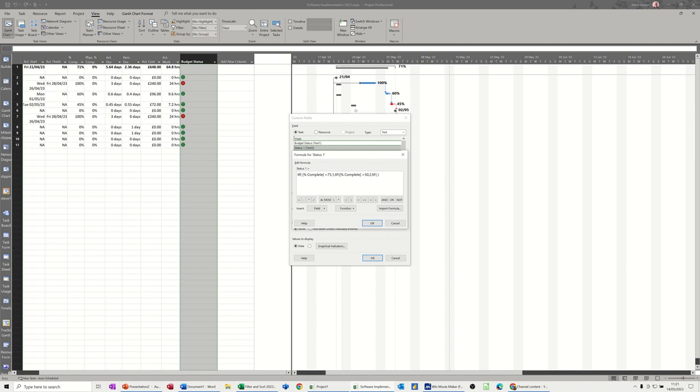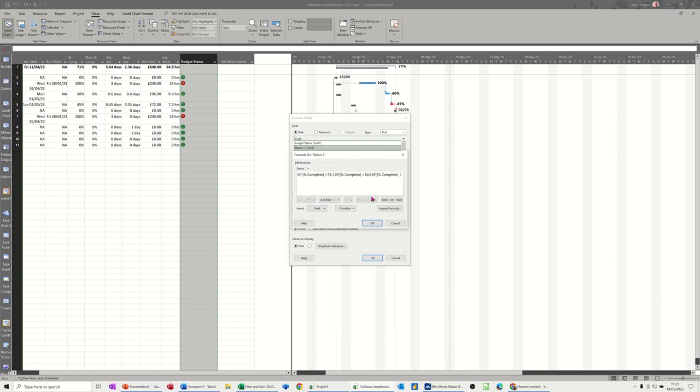So you're getting three nested ifs. Field, number, percentage complete is greater than 25, comma 3. And then if none of them are true, it comes all the way to the end, comma 0. And then I'll need three brackets to close this off, because I've got 1 ifs, 2 ifs, 3 ifs.